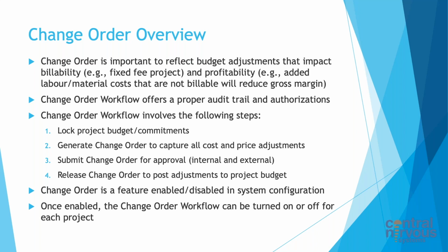By having change orders, if I want to make a change to the revenue budget or cost budget, I need to go through a process that someone else needs to approve. As such, I'm not just adjusting the numbers to make the project look good.